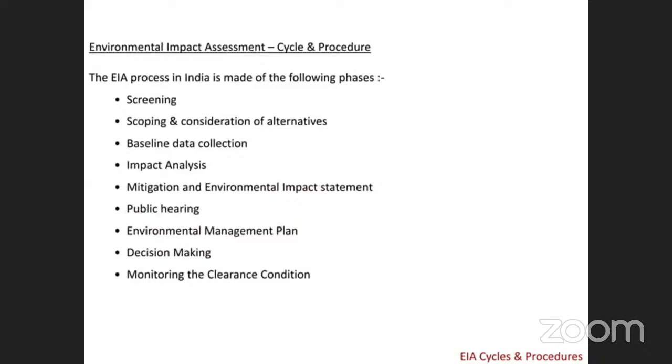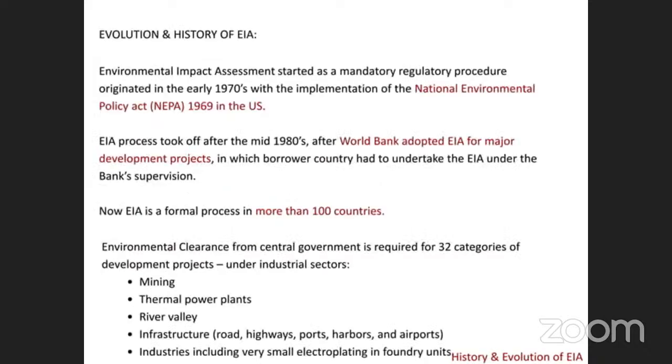The Ministry of MOEF notified the EIA legislation in 2006. The notification makes it mandatory for projects such as mining, thermal power plants, river valley projects, infrastructure development, industries.